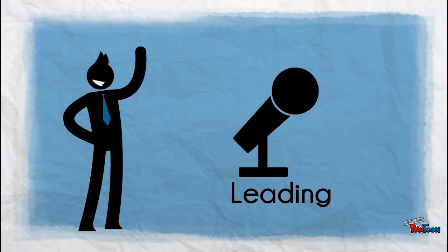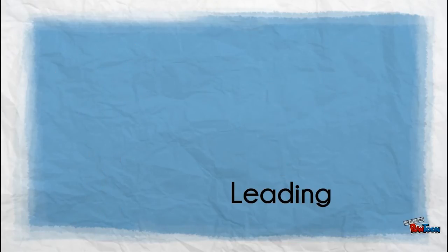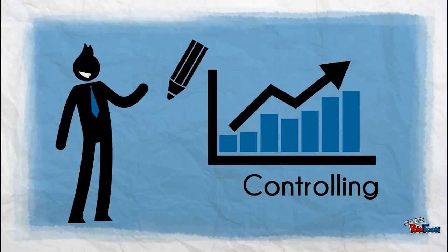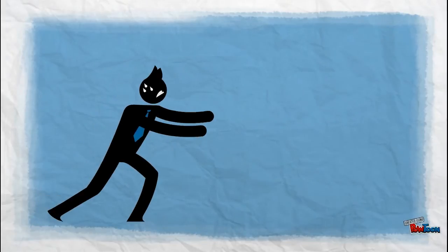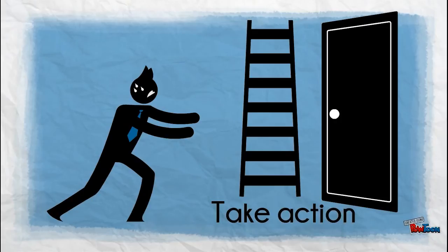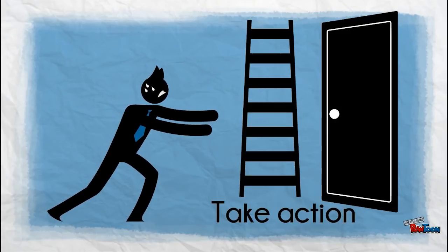For leading, manager need to guide people and they can communicate with other parties effectively by using the 3D and the 4D model. For controlling, manager need to ensure activities are done as planned and all the 3 models can help see any deviation between the actual performance and the planned run. The manager then needs to take corrective action for any discrepancy. MSP can help find out course of action not affecting the critical path, and 3D plus 4D model can help foresee the feasibility of the action.